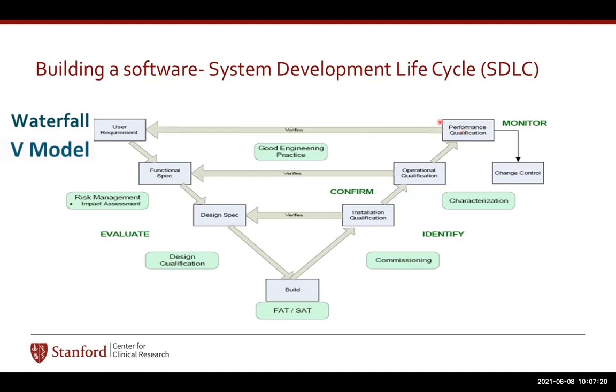And then once you have deployed a system, it is under change control. It is monitored. If you make any change, then you have to test the functionality again and see whether the change that you made impacted any other functionality. And that is also one of the important things to do. You will be surprised: I did not touch any other things, so how can they be affected? But, excuse me, they could be affected. So if you understand that, then this is the way we make a software system, no matter whether it is based on SmartSheet or an Excel file or the SAP system.